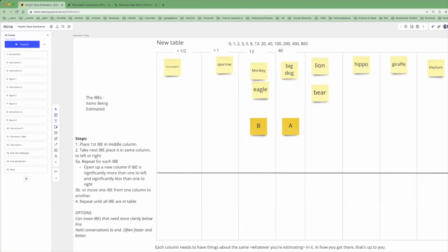It does 2 things. First of all, it's just meant to be used for like yesterday's weather. I did 50 story points last week, then I'll expect to get about 50 story points this week. If people want me to do more, then, well, if I learn how to make the system better so I go faster, that's great. But basically, I'm going to assume yesterday's weather, I think Martin Fowler came up with that term, is the best way to measure it.